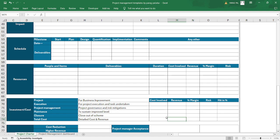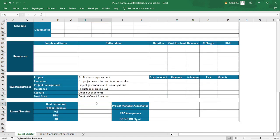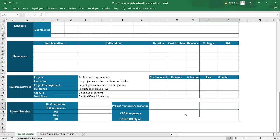You can also define the closeout cost, total detail cost, discount provided to the client, higher and lower revenue, rate of interest, net present value (NPV), and internal rate of return (IRR). You can calculate IRR using the Excel function =IRR(), and similarly ROI and NPV. After all this, the project manager writes comments and signs off, and the CEO reviews and either signs or requests revision.